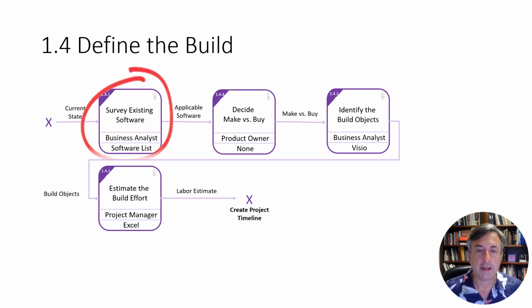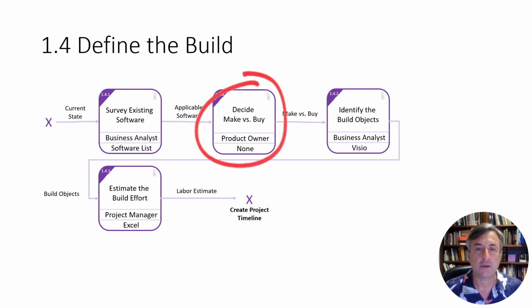And then you're making the decision here at this point. It says, okay, given a high level understanding of this software, does it make sense for us to build it from scratch, or should we go ahead and just buy it? And that's a discussion you're going to have with your whole little team, planning team, IT management, primarily IT architects, and come to a general decision. Yes, for these requirements we can buy right off the shelf. These requirements we need to build custom, and get that kind of list together, and you come out with your make versus buy decision.